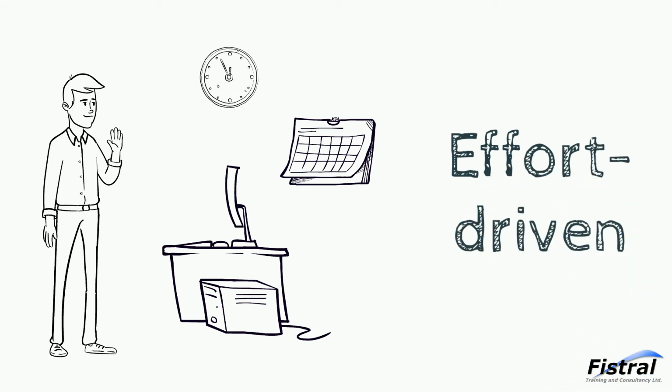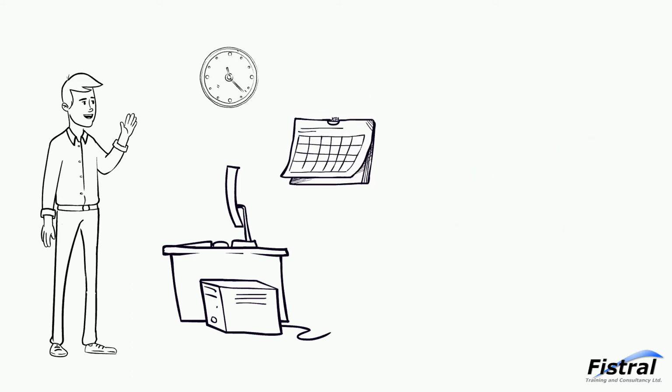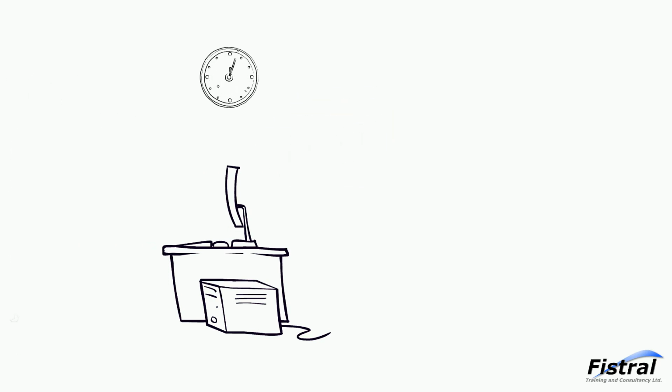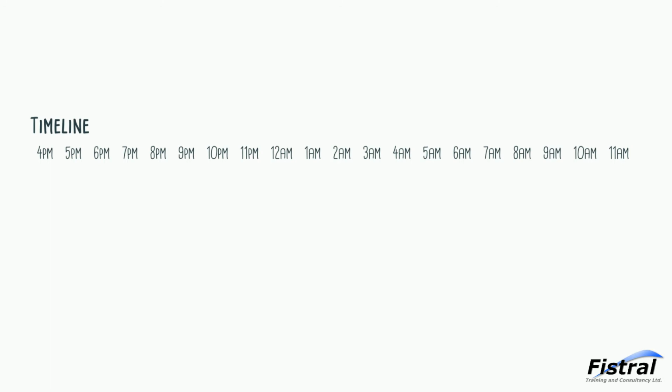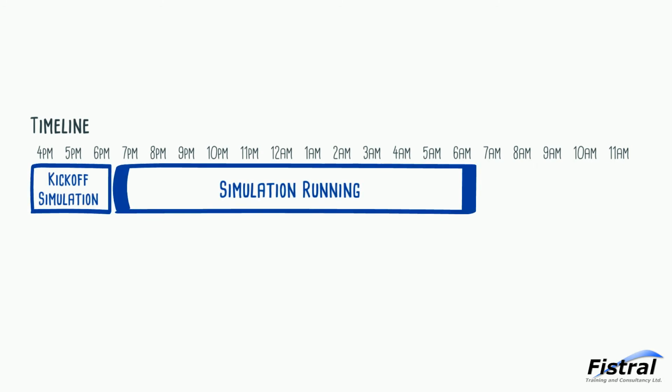However, if you think about it, many passive tasks are not scheduled using a working calendar. Paint drying takes as long as it takes. It doesn't stop at 5 o'clock and then resume the next morning. It would dry overnight. So by identifying these different types of tasks, we can begin to optimize our schedule. If possible, scheduling passive tasks for typical non-working time. For example, it's why most IT departments will schedule their system backups for midnight on a Sunday. It's automated, so no one needs to be there, and the network isn't as busy, so there'll be less disruption.